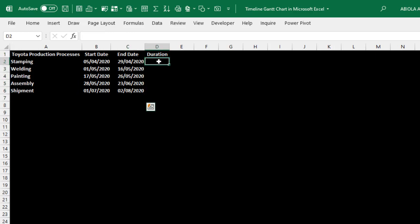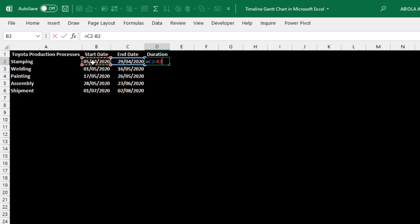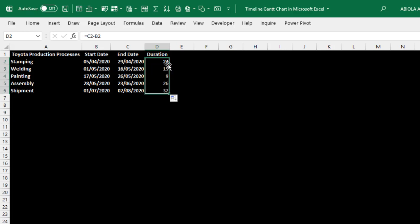I want to calculate the duration from the end date minus the start date. I want to see how many dates it will take us to complete each of the processes. So let's do that using a simple formula. Equal sign, we take the value, the date value in cell C2 minus the date value in cell B2. Then we control enter. The first process which is stamping will require 24 days. Let's use the autofill to fill down. You can see that for welding, it's going to take 15 days. Painting is going to require 9 days. Assembly, 26 days and shipment.